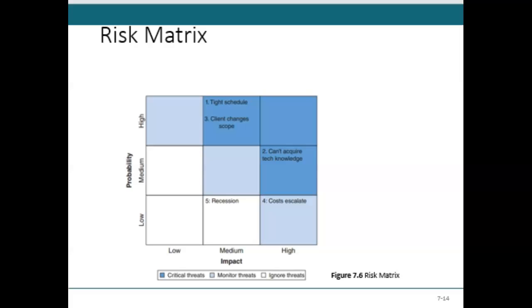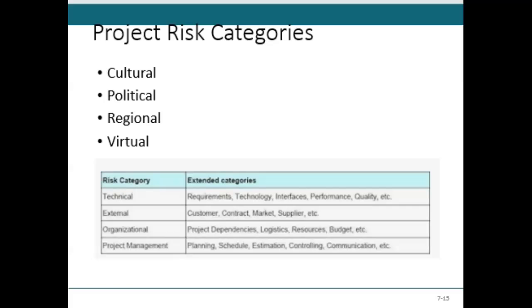Notice the output, which is the chance of something happening, and then there's the impact. There will be consequences or results. Our final deliverable, the project, needs resilience, right? Sometimes we call these the top right, unknown unknowns, emerging risks along the way. If it's really bad, you don't want to plan further in more detail. The ones in light blue are recognized, I watch them closely, and they're tackled by developing project resilience, contingency reserves and flexible processes, and empowering and trusting people to be proactive. The ones in white have low probability and low project impact. I would just put them on a watch list. I'd review it once a month or so to see if it is changing.